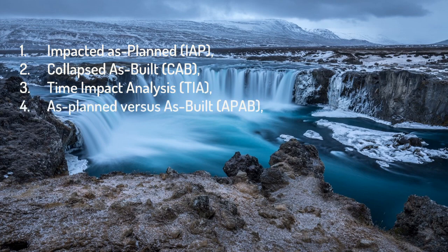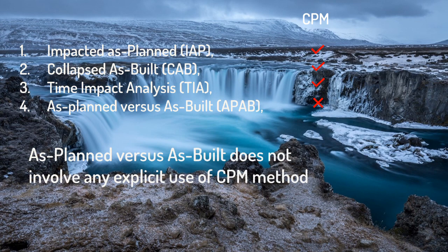Three of them are based on CPM methods, which are impacted as-planned, collapsed as-built, and time impact analysis. However, as per AACE, one of them, which is as-planned versus as-built, does not involve any explicit use of CPM method and can simply be an observational study of start and finish dates of various activities.